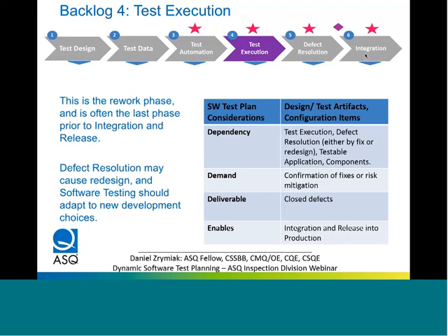This is something we want to move away from, because doing a finish-to-start leaves a lot of idle time, and the idle time and waiting time expands the duration of the project. It also misses opportunities where people could be doing something constructive to actually improve the execution of the tests.